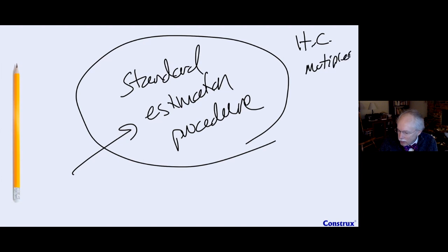And so you might say, whatever I say, multiply by 3x. This is something I do with my wife. If she says to me, Earl, how long should it take? My gut estimate is this, and then I quickly put on the Earl incompetence multiplier. It says I should only take 15 minutes, but I should double that because, no, this is that kind of work. I need to triple this work. So when I talk to her, I can say 45 minutes rather than the 15 my gut tells me, so that I probably will come in on or before that, and I can make it into a promise.